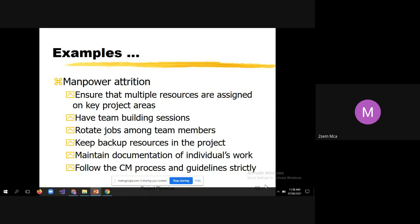Another example is manpower attrition — this is very important because manpower is the major source responsible for implementing the project. Ensure that multiple resources are assigned to key project areas. Wherever you identify implementing certain requirements as critical, allow extra resources so that if one person leaves the company, the remaining people can cope up and finish the job. Have team building sessions — these are very helpful. Team building sessions discuss the criticality of implementing the project, major issues, and procedures to address them.